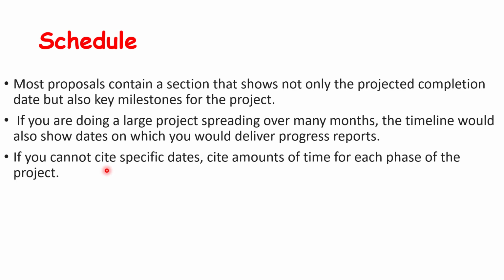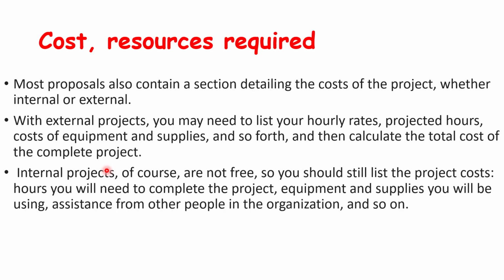You can also research online for the equipment prices and the availability of the equipment by calling the vendors rather than visiting their actual shops. But if certain situations occur, then you can provide an estimate of about 3 months rather than just including a date like 17th April.